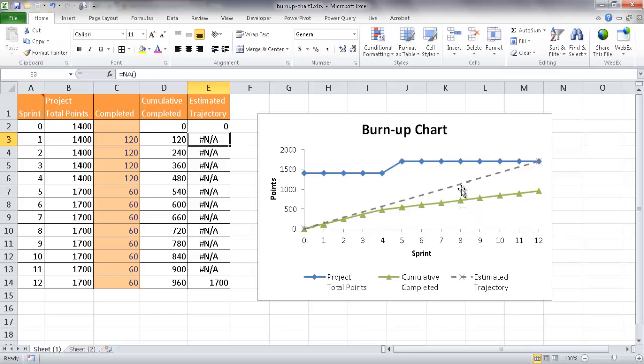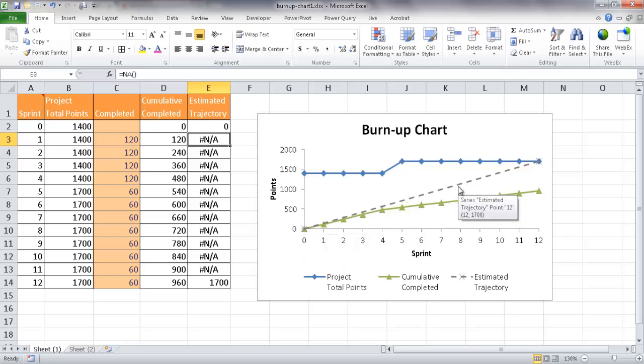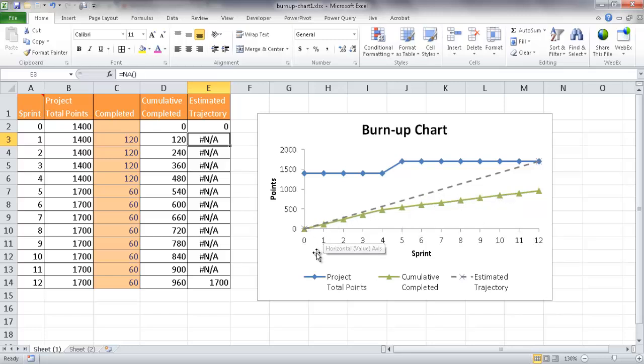And in this particular example, I'm going to include the estimated trajectory. So basically what this is implying is from the beginning of the sprint cycle to the 12th sprint cycle, this is the trajectory. The straight line is what we estimate that it should be done at. Through the first sprint, second sprint, we should kind of have this straight line. So it's kind of an estimate.